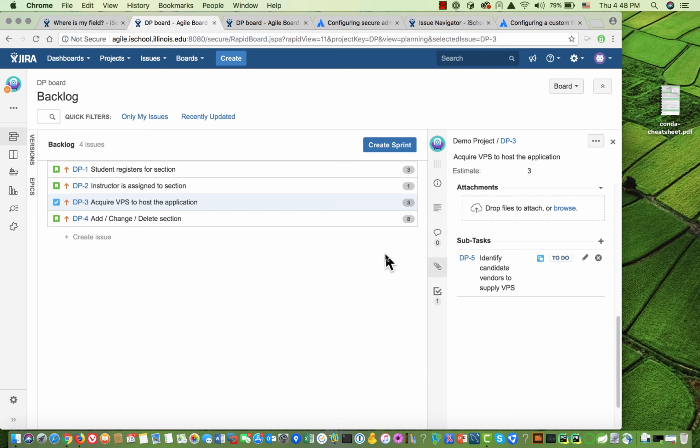It was on all the time, and now for tasks it's on now. It wasn't there before, so you ought to be able to go back and fill them in. And the setting on how we calculate the burn down, whether it's by hours or by story points, we haven't turned on anything for hours, so it's by story points. So the burn down chart should be by story points.